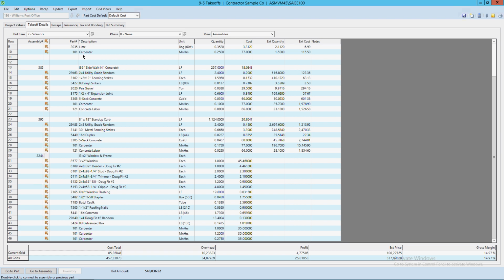So you can format the software so that it is built into bid items, so that this is the way that your customer wants to see the particular estimate, and it will actually do the full proposals for you from here. Okay? It'll also break it down into phases, which is the way that you might understand it for your job, if we're dealing with two different buildings, or we have a steel contractor, and what they like to do is do the estimate by floor. You know, how much steel goes on to the first floor, the second floor, the third floor. And so they just keep track of all of the information that needs to be available for each one of the floors. Okay? But you can set this up yourselves.